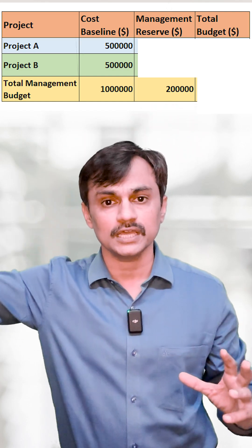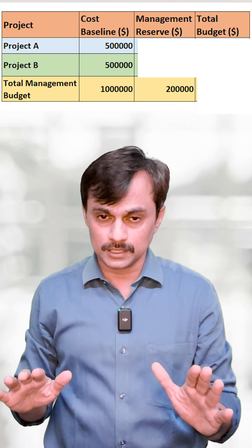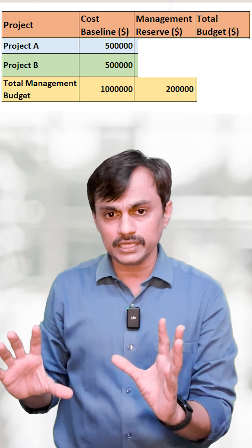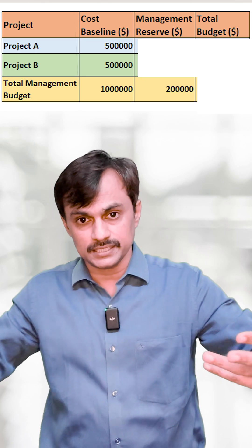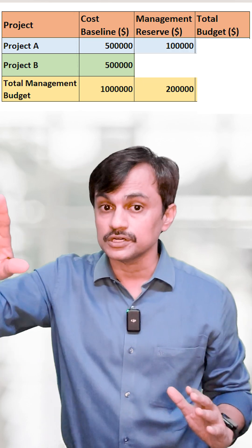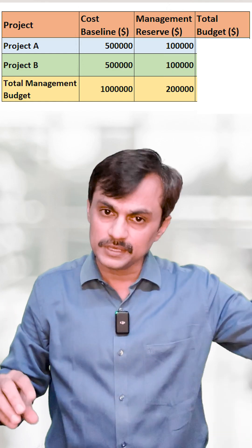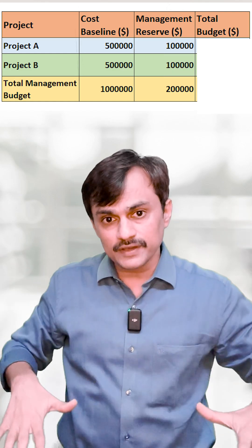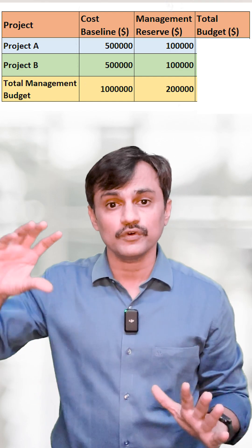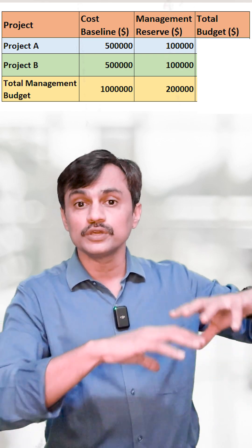Some third project comes and says 'give me that $200,000.' My management says: these two projects say they need $500K each only, but looking at my assessment of uncertainty, I want to keep on top of their cost baseline $100,000 reserve for Project A and another $100,000 reserve for Project B. So I don't want to invest the remaining $200,000 anywhere — I'm putting $100,000 as management reserve for each project.